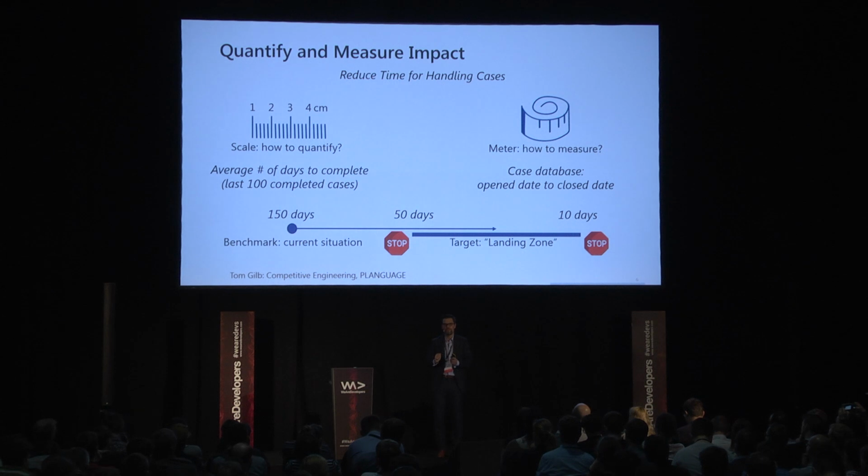It doesn't help you if you find out after you have burned the whole budget that this was a failure. That's why a lot of projects that can only find this out after the project was delivered don't want to even know so explicitly that this was a failure. The other condition is even harder, because it tells you when you can stop because you were already successful. Even fewer projects stop when they have already reached the goal and turn their attention to something else that's more important now. So that's why these two boundaries are also important. Not only because the precision would anyway not work to find one discrete value, but you want to use this stop condition to steer.